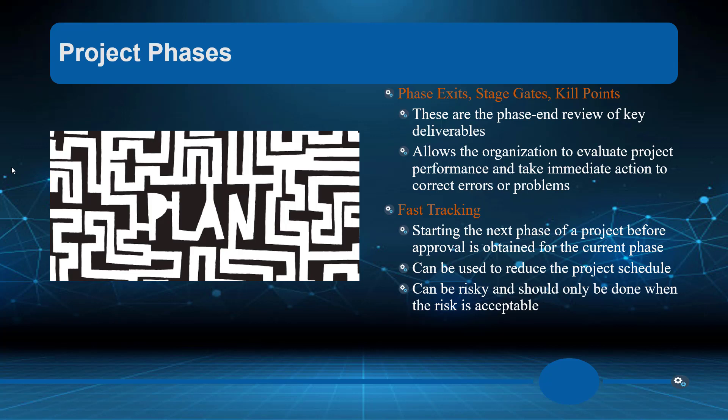In Waterfall, we wouldn't do that, but in Agile we want to keep moving. Of course, there's inherent risk — it should only be done when the risk is acceptable. What happens if we start investing in phase two and phase one is not already done? In some cases we can. What I tend to do is look at phase one and say, this is going well, we know it's going to complete. The risk seems to have been reduced or is non-existent, and thus we can actually start phase two knowing that phase one is indeed going to happen.